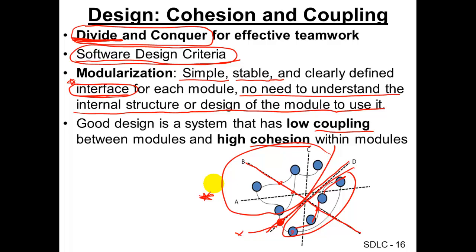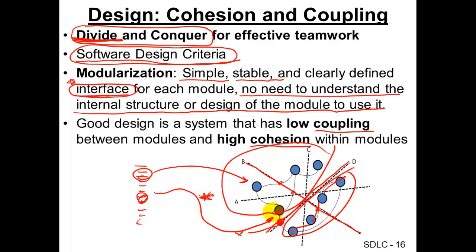If you cut at D, the teams working on each subsystem only need to deal with one interface. They agree on interface X — what is sent in and what is returned. What happens internally is irrelevant to the other team. You have a very clear, well-defined interface — only one interface instead of four. Where you cut is very important. A lot of times you have a laundry list of things to do, and you need to group certain things together into modules, then define their interfaces, and decide how to divide and conquer.